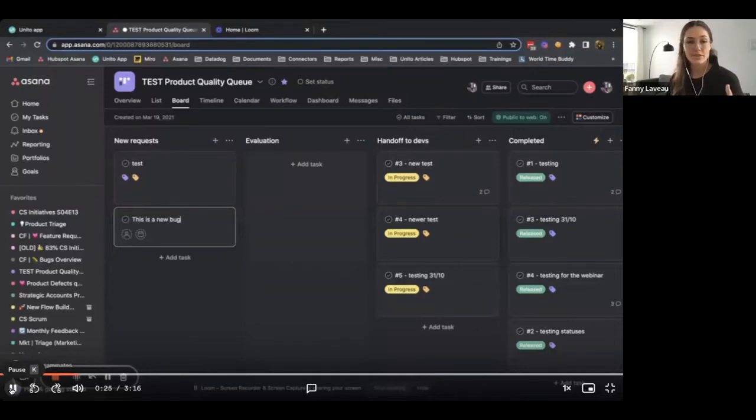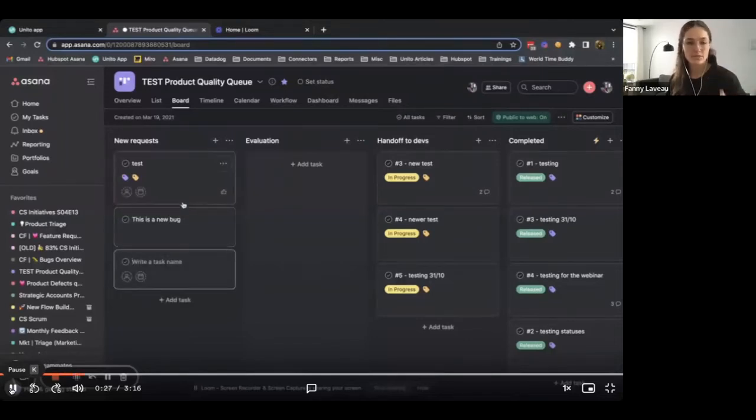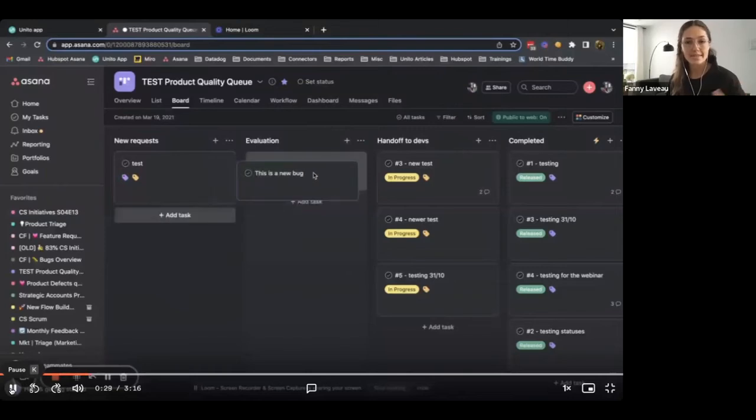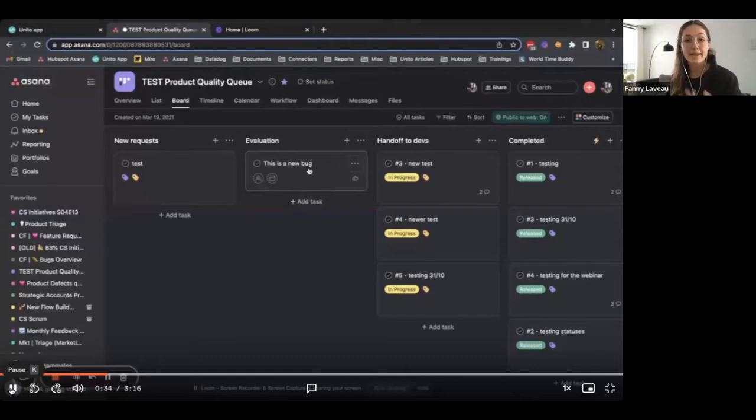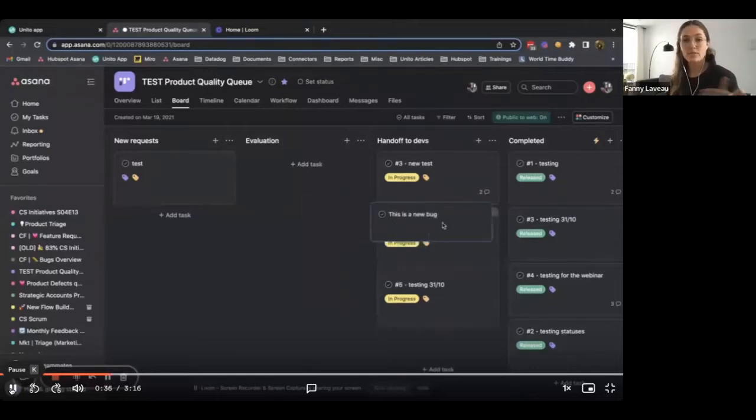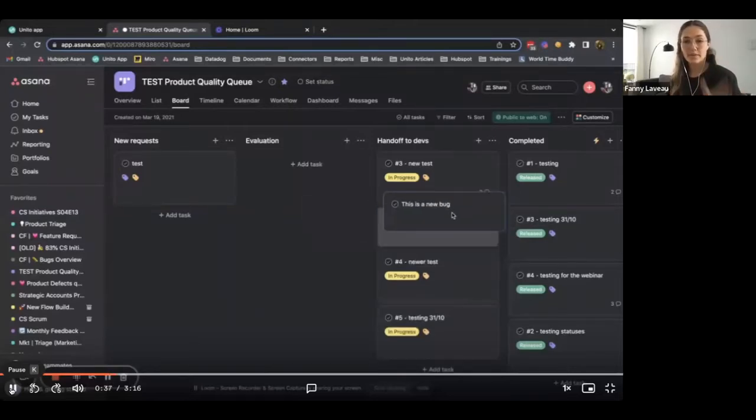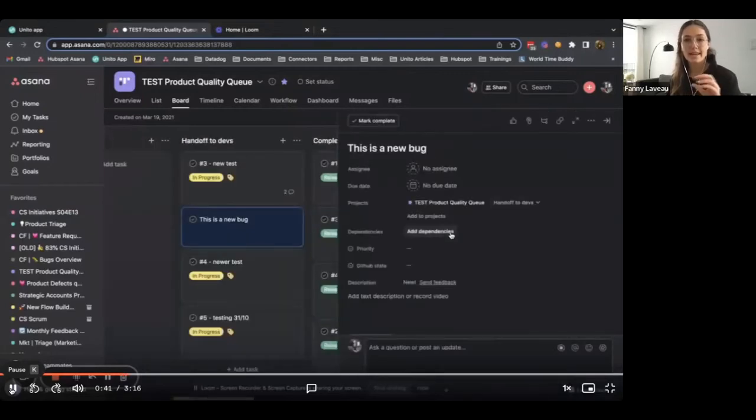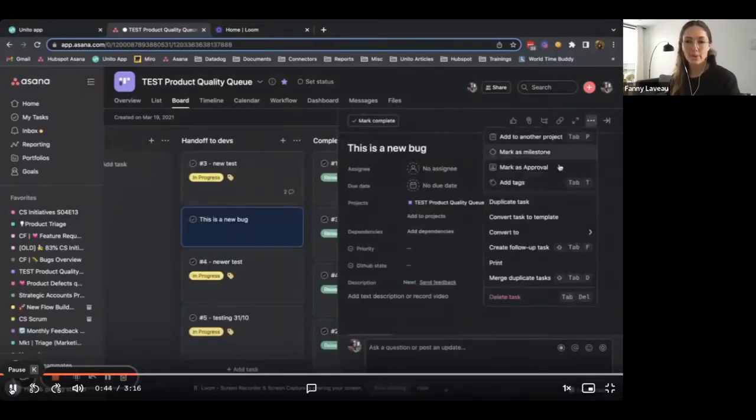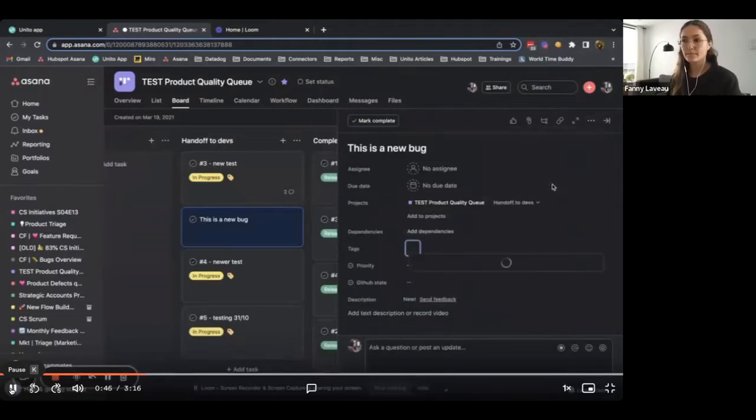Then our project managers, pretty much on an everyday basis, would jump in here to triage the tickets, probably place it in the evaluation phase to start with. And when they're ready to hand it off to the devs, they would move it to the column, hand off to devs. And more importantly, they would open the task and add a label with the name of the repository that they want to send it to in GitHub.